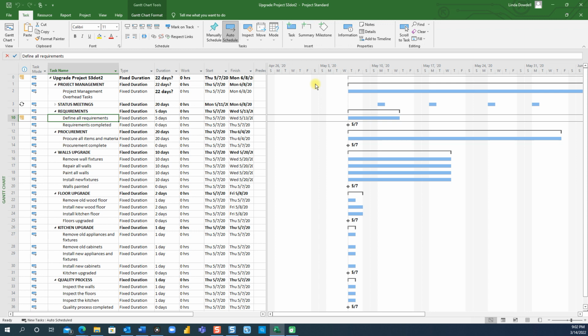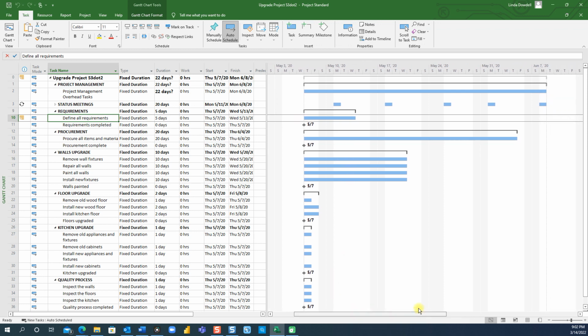Displaying the project finish date and total duration on the Gantt chart entry table. And you will notice, if we move a little bit to the right, that the project summary task has this upside down left side bracket line. Notice up here, it goes all the way to the project finish date, and it's a thin, light gray horizontal bar, very light gray. And every time you see that light gray, that represents the project summary task.